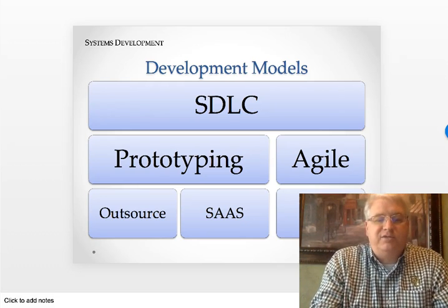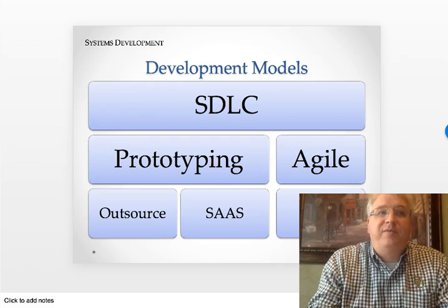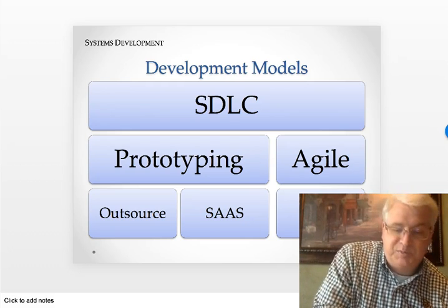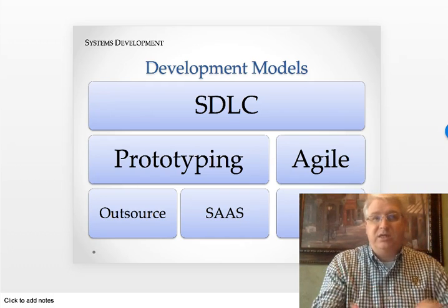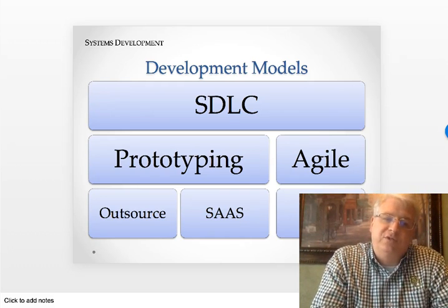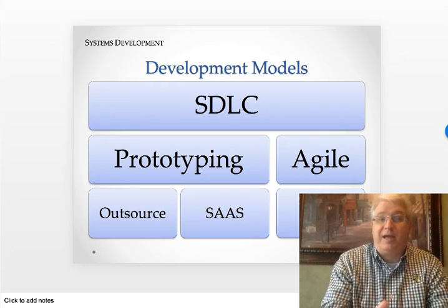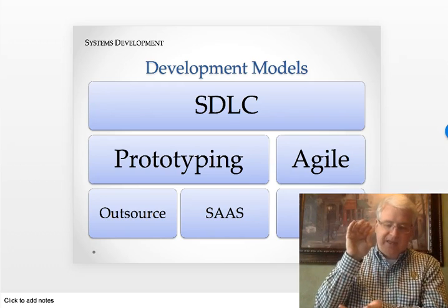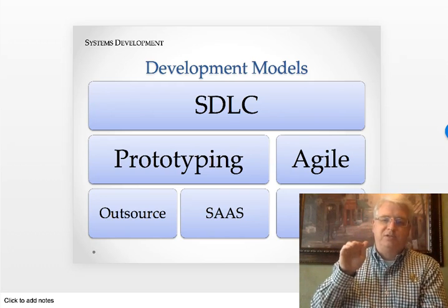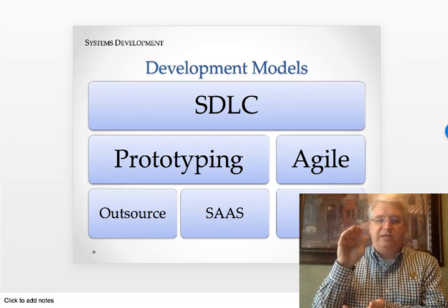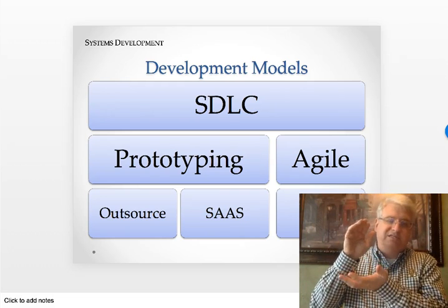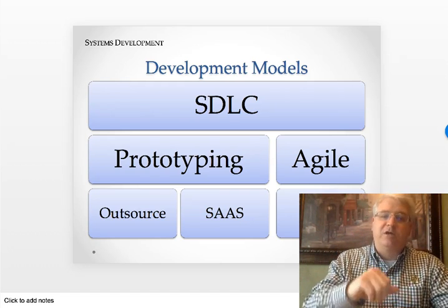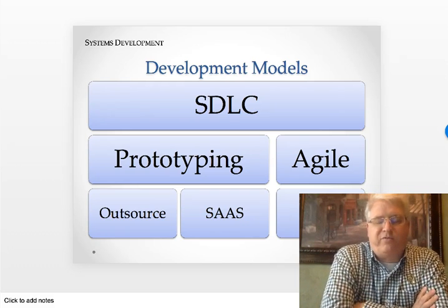That is a development methodology that is the primary development methodology, but it's also one that's falling out of favor. In large part, it's because the speed of business is moving much faster than it used to. Things have to happen fast. The biggest drawback to SDLC is that it starts with the idea that you have a completed list of all the tasks that need to be accomplished. Well, what if you don't? What if you have the first 10 and then the rest you discover as you're going? That really throws off a software development lifecycle approach, a waterfall approach.